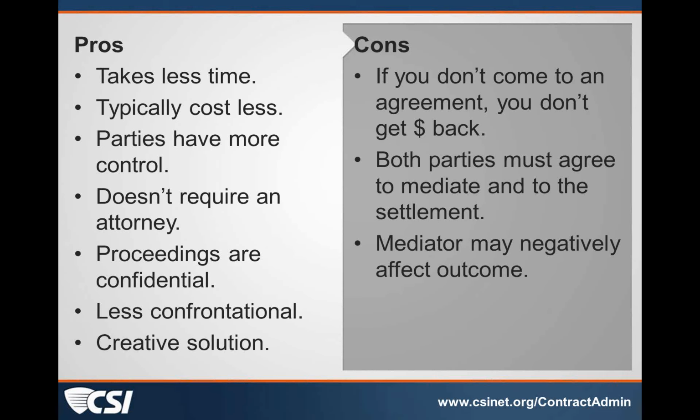So you can put language in there saying the dollar amount has to be submitted within X number of days of the completion of that change work. You can put time limits in for submission of claims and for submitting the dollar amounts in the claims, and those will be upheld in most courts.